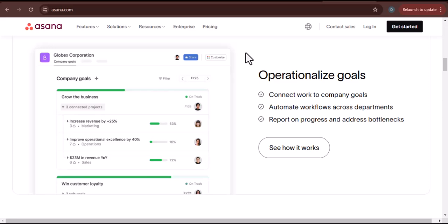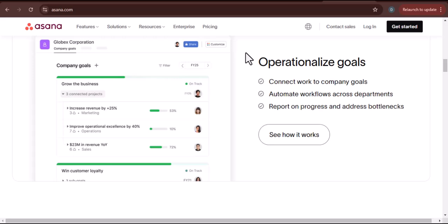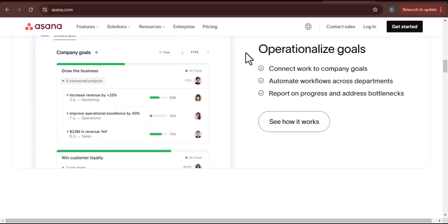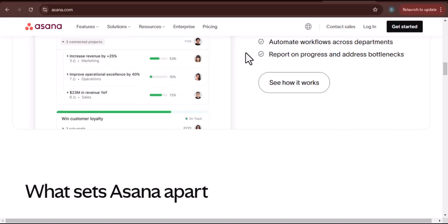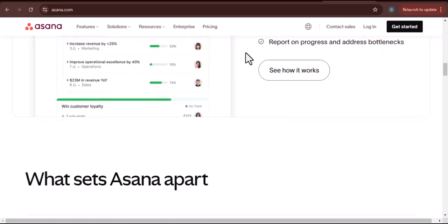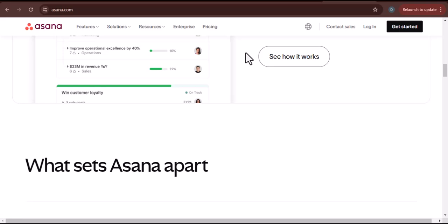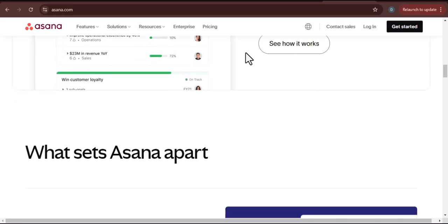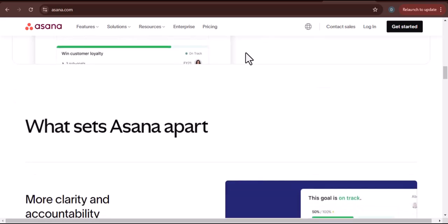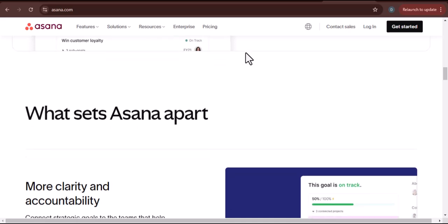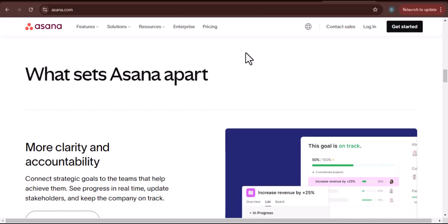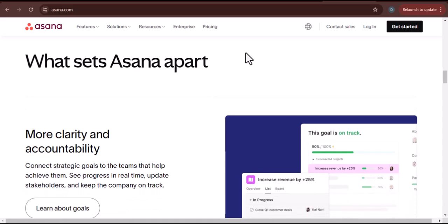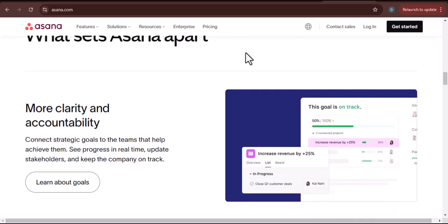Asana is a powerful visual tool. It's designed to be a dashboard, a living, breathing representation of your project's progress. But what it's not always great at is deep dive analysis. Maybe you need to calculate the average time a specific task type takes to complete. Perhaps you want to create a burn-down chart that's not available in Asana's native reporting. Or maybe you simply need to share a static snapshot of the project with a stakeholder who doesn't have an Asana account. The ability to export to a spreadsheet gives you that flexibility and control.